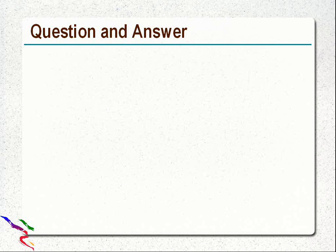Shampa Ganguly has asked, is story point estimation in Agile effective? It is very, very much effective and required. Story point estimation should happen to find out the velocity, because velocity is very useful for the new initiatives that come into the product, to estimate how many sprints that initiative may take. So it's required for the product owner.